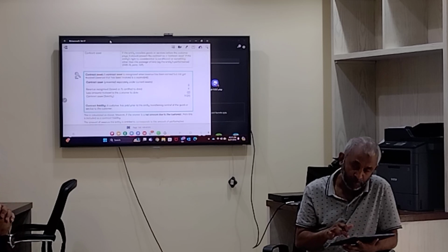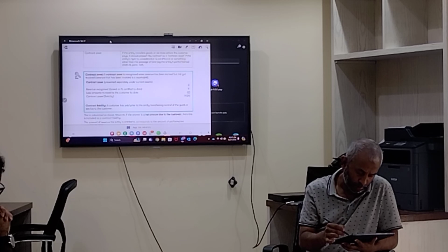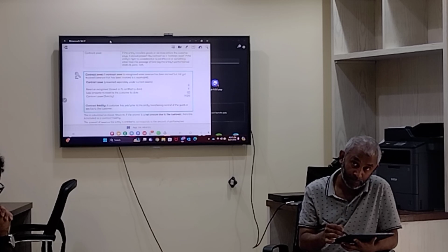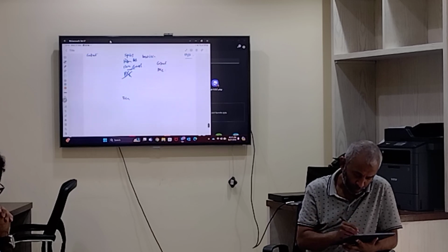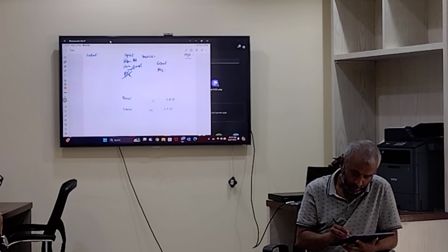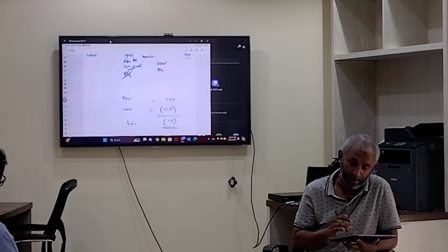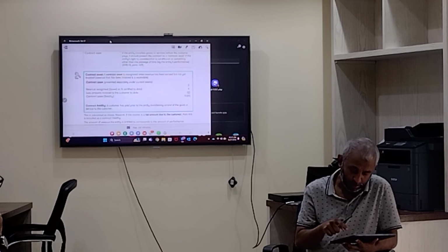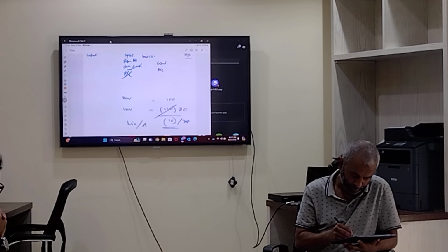is the difference. Sometimes your revenue is 100, amount invoiced is 110. So you understand that. Your revenue is 100, invoiced 110. So you have minus 10. This is a liability. That's called contract liability. Whereas if this one is 80, then you have 20. Yeah, that is an asset.